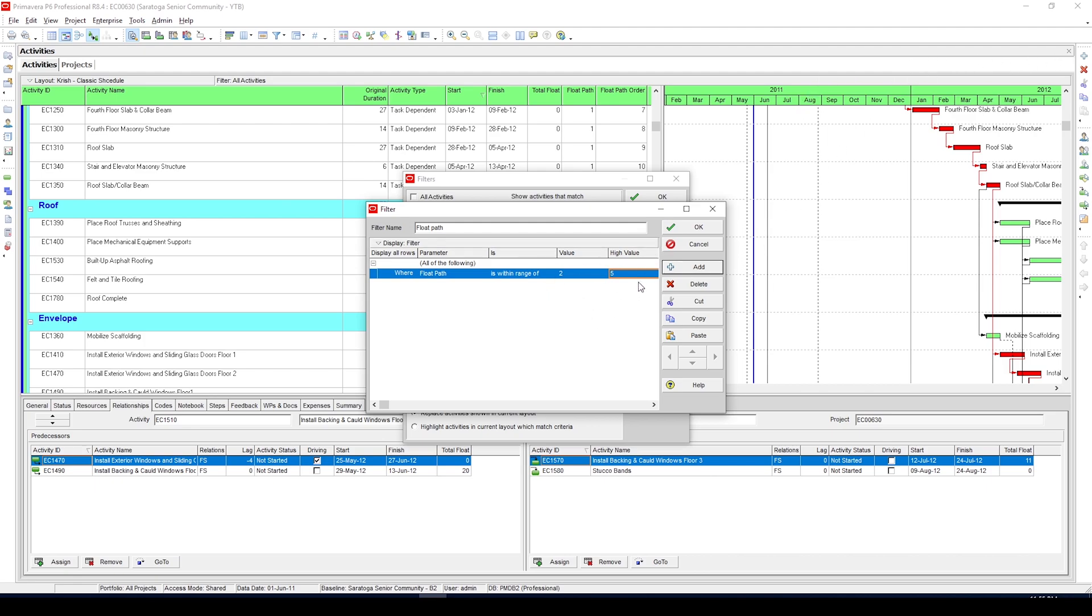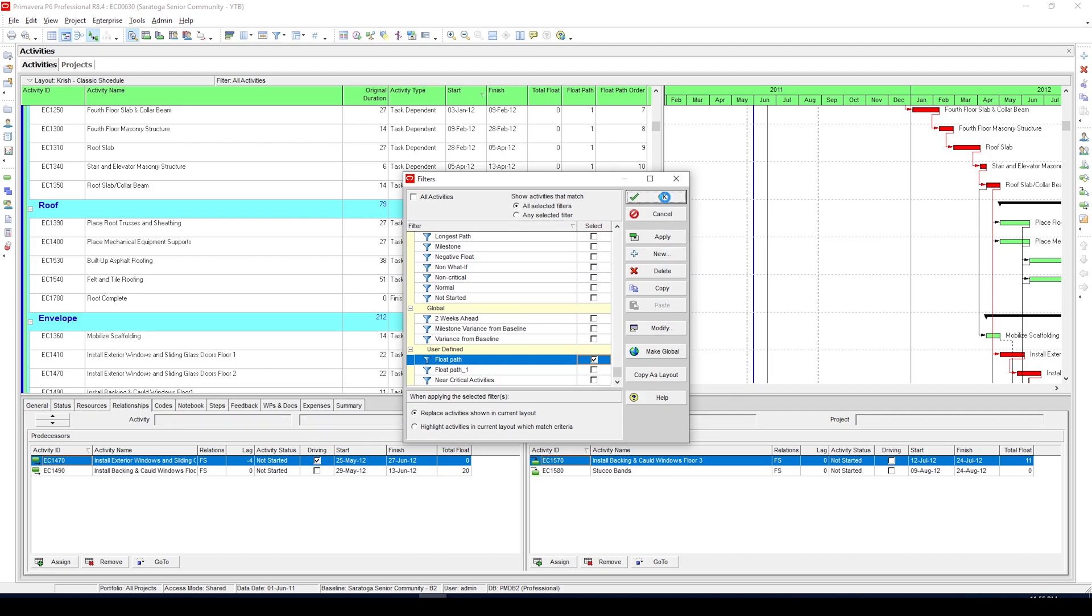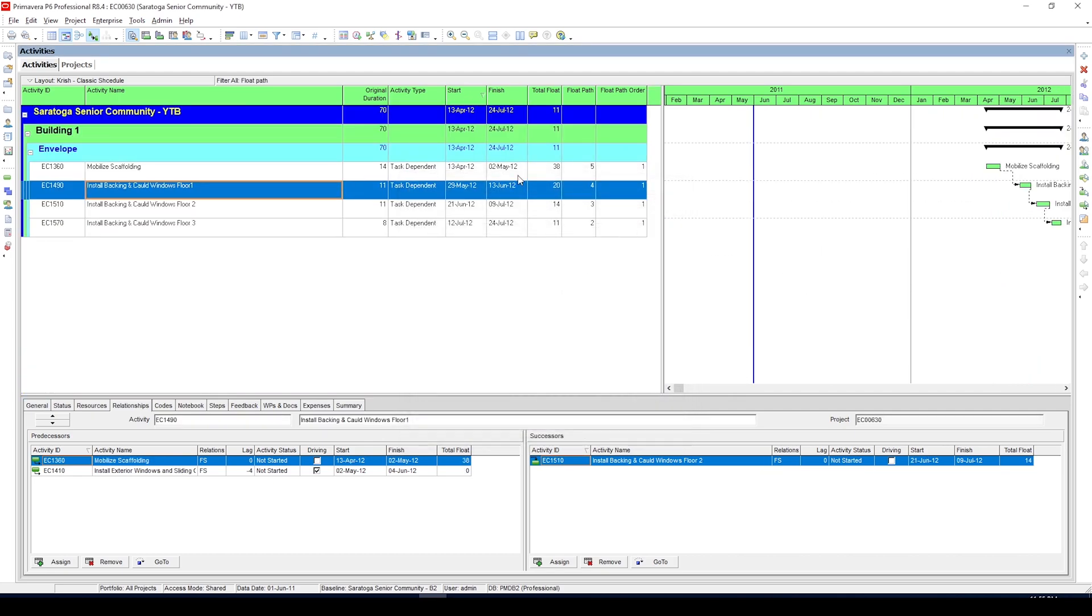Okay, so after we apply the filter you can see all the near critical activities. The benefit of obtaining the near critical activities using float path method is it works even in complex schedules where you have several constraints or project deadlines. It will not affect the results even when the constraints or project deadline alters the total float of schedule.